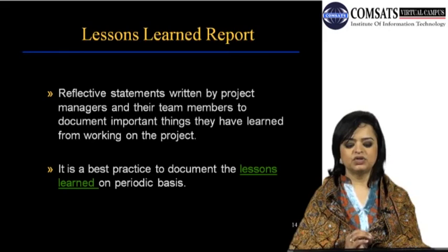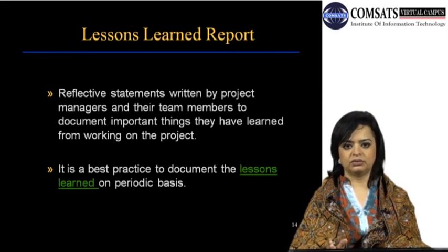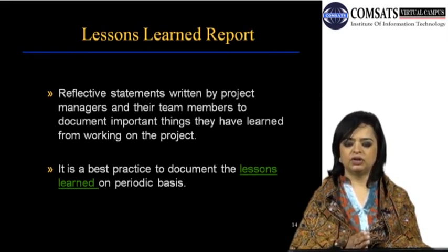It is a best practice to document the lessons learned on a periodic basis. So what is a periodic basis? In a smaller project, during the midlife of the project would be a good time to do a lessons learned, and at the end of the project. In a larger project, at the end of every phase would be a good time to do a lessons learned.